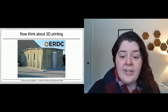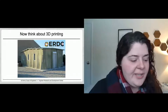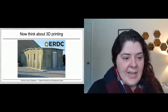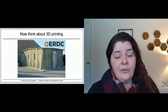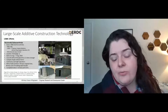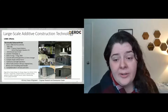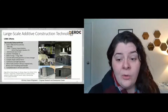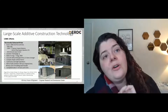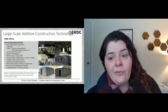And the real story related to that formwork that I need to tell you is that all of these roof panels on this building are cast. And when the Marines came out to build this, and they build forms for a living, they told us that these roof panels could potentially be done in about 3 days for just the formwork. The formwork alone, just for the roof, it took over 4 weeks to get done with grouting and reinforcing and everything.